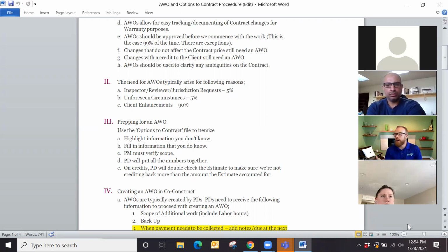So that should have been an unforeseen, because the flooring company that did that charged us for it, but we missed that opportunity for that discussion with the client. Right. You never would have thought that Ditra would have been put down, maybe in a bathroom, but even that would be an unforeseen. But to be in the kitchen floor, no one would expect that. So it took two extra days of demo to remove that floor.